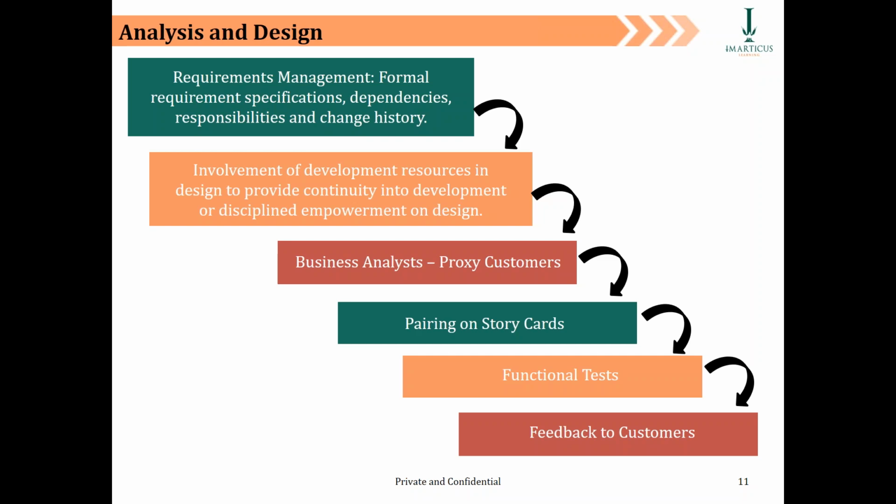That is called pairing up multiple people, at least two people is pairing, on story points, so that you can eventually take a median of all, and that becomes your estimate. And if you saw in yesterday's video, even that is not a precise way, it's just a guess estimate, but it's an intelligent guess estimate. And then story cards, and then it follows up with some testing, and then you're ready to feed back to the customer, and they tell you what is right, what is not so right, and then you bring it back and run the whole cycle again in order to rectify that.